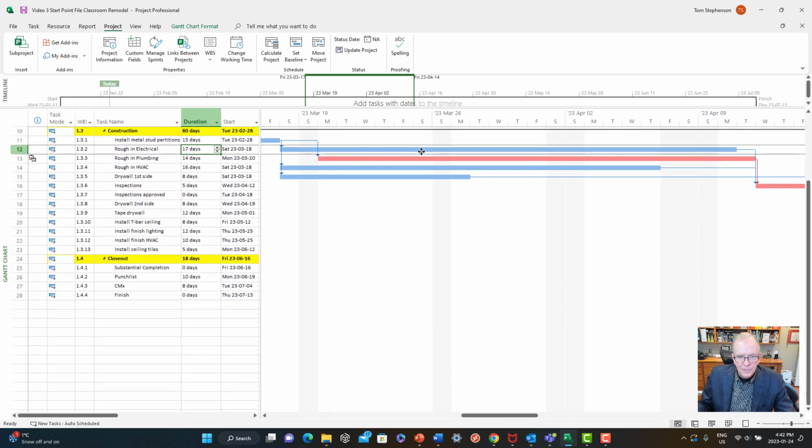So you got 1, you got 6, 7, you got 5, that would be 12. 13, 14, 15, 16, and there's the 17th day. So that's what's going on. Now here, it couldn't start on the Friday, right? Because that's a non-working day. Remember, we deleted that part on Saturday. They don't work Saturdays, so it didn't start their work till the Monday.